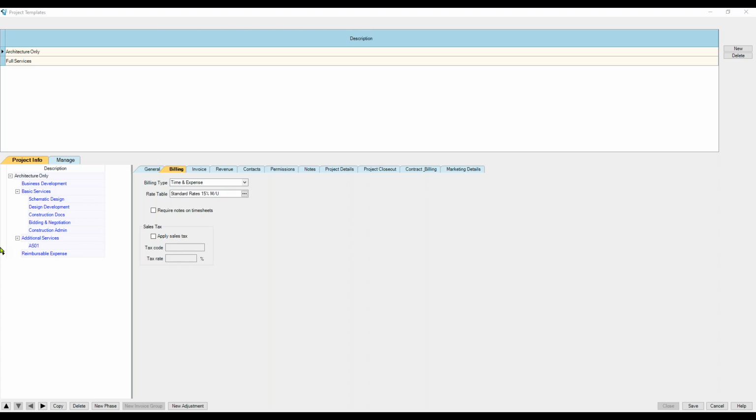And Tanya has asked, can employees enter time in timesheets if it exceeds the contract amount? Yes, they can, which is why we really recommend updating phase statuses. The long and short of it is we know that some phases come in under, some phases come in over. And so we can control time entry by the phase status, but that's really why our PMs need to be watching their reports, because they need to take an action.